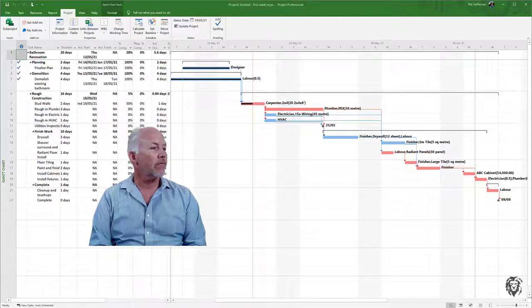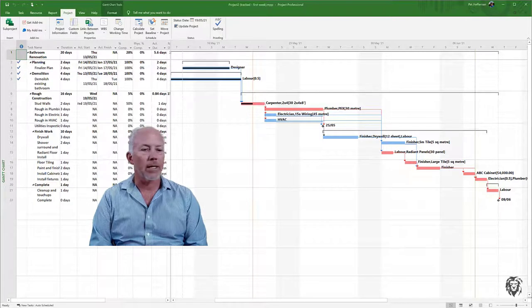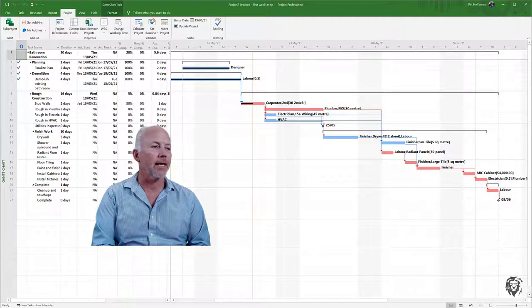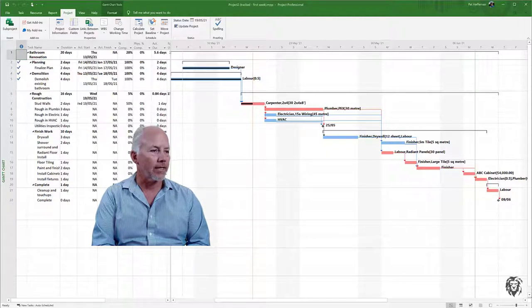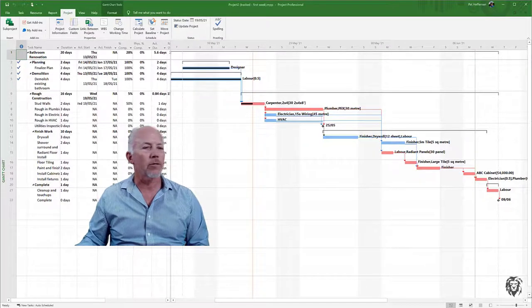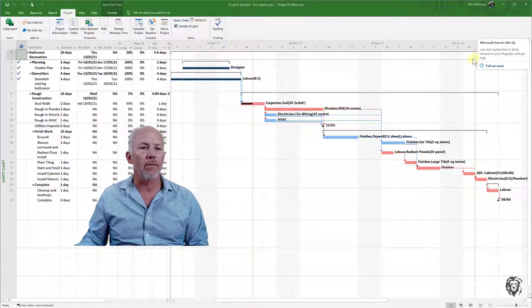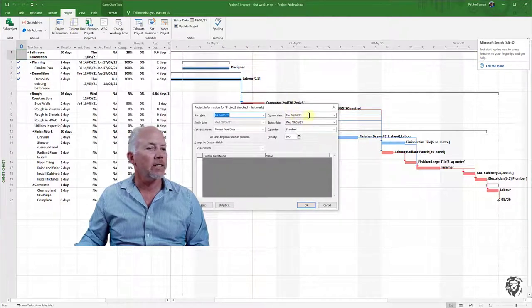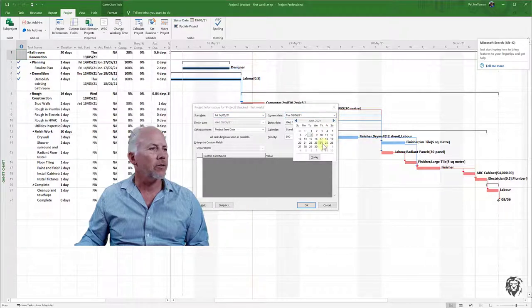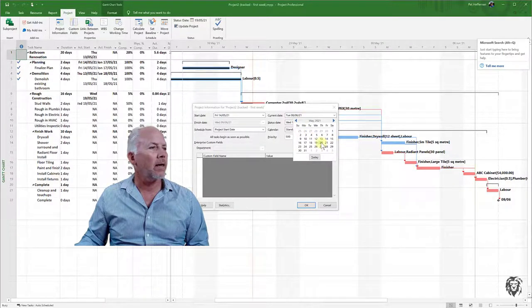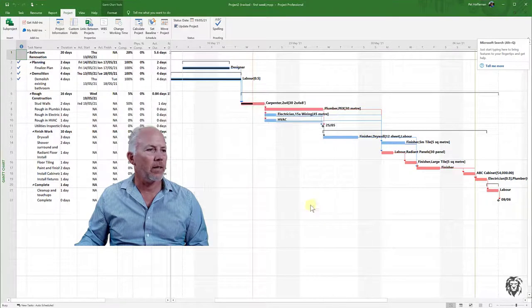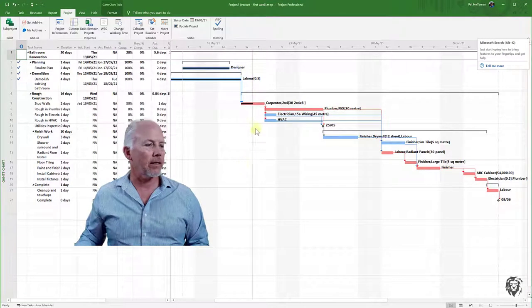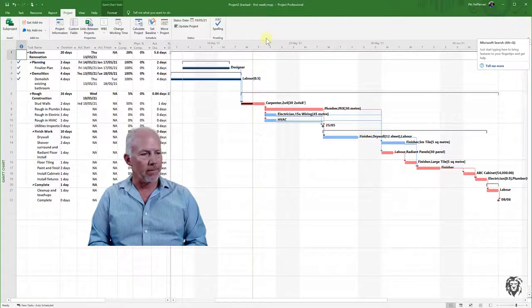First, I've gone back and opened up an older version of our project. This is after our first status update on the Wednesday of the first full week. Like in the last tutorial, I'm going to quickly reset today's date so it doesn't confuse people. I'll go to Project Information, set current date, and choose May 16th.